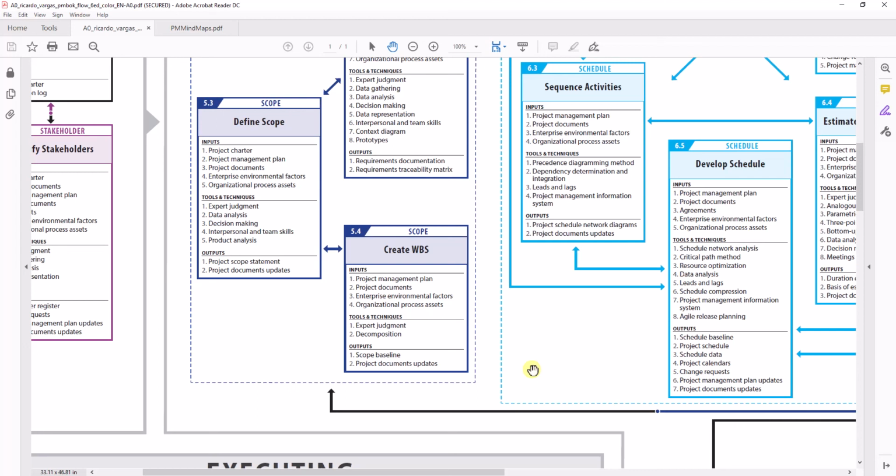And then there is a 100% rule. The 100% rule means when you roll up the work across all the bottommost levels of this WBS, which is the set of work packages, the sum of all the activities that you have described at the lowermost level, when you're defining the work packages, if you add up all the work defined in these work packages and roll it up, the sum of all this should equate to the total work.